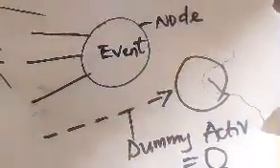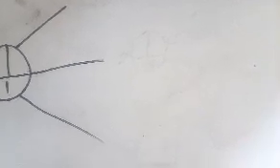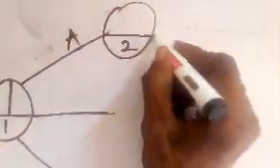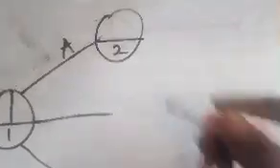So coming back to the question, it says activity A has none, activity B none, activity C none. Can we see? So you see, when we get to C, if you look at the C from the question, it says C has none, but D has A as its predecessor. So that means D has A as its predecessor, activity 2. You see how I got my activity 2 based on its predecessors.